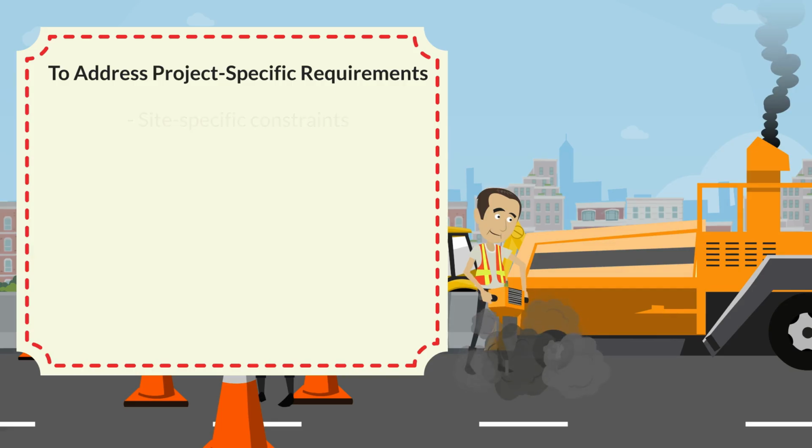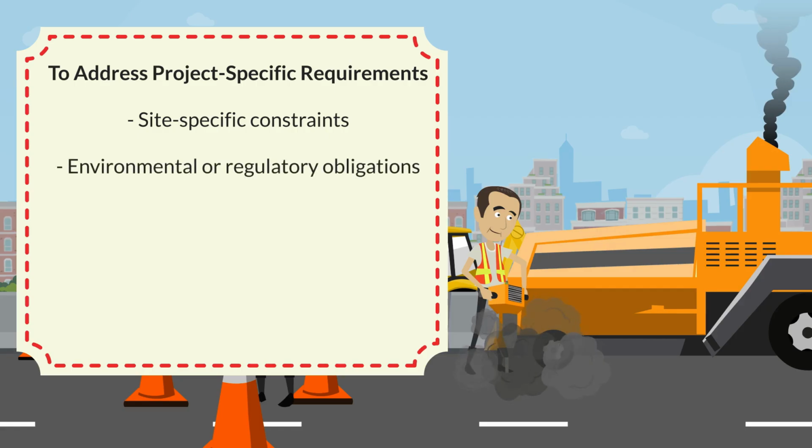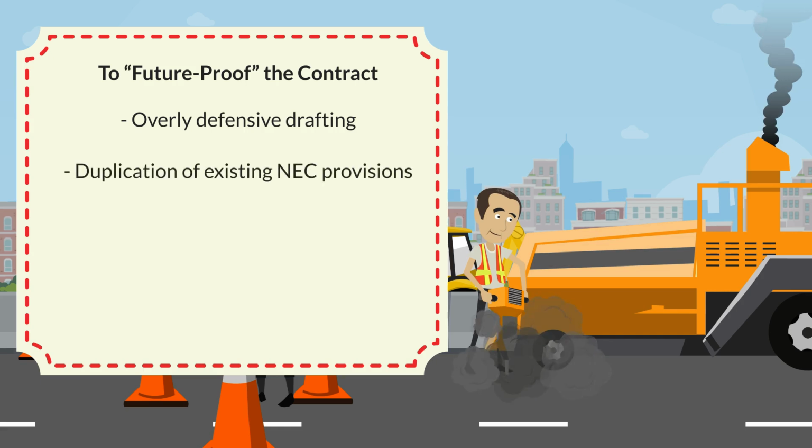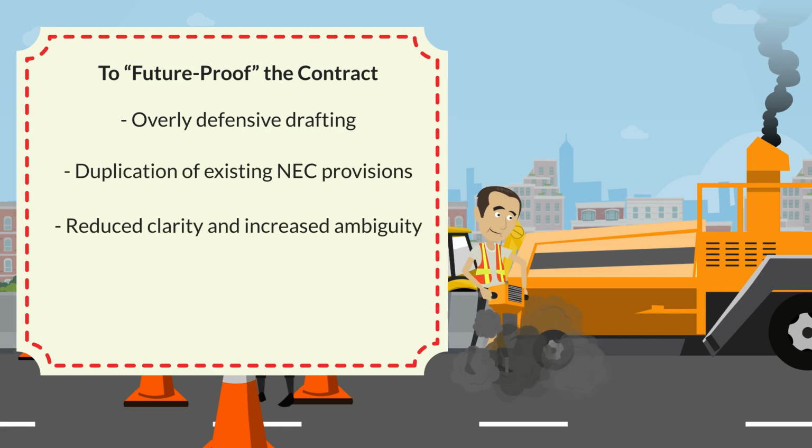Z clauses can introduce site-specific constraints, environmental or regulatory obligations, and third-party interface requirements. Some clients add clauses based on past disputes or lessons learned. This often results in overly defensive drafting, duplication of existing NEC provisions, or reduced clarity and increased ambiguity.